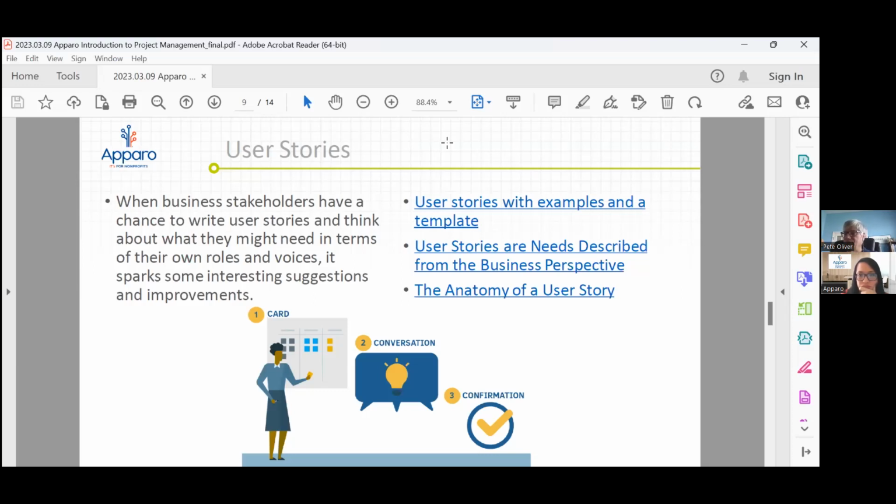And then a different user: as a membership coordinator, I need the ability to update and change course pages so that I can reflect when it's moved to wait list only. And lastly, as a marketing team member, I need the ability to make course page changes so that I can successfully market a course. Again, three different people are going to use what you're producing, but each one has a slightly different take. That's what user stories are about.